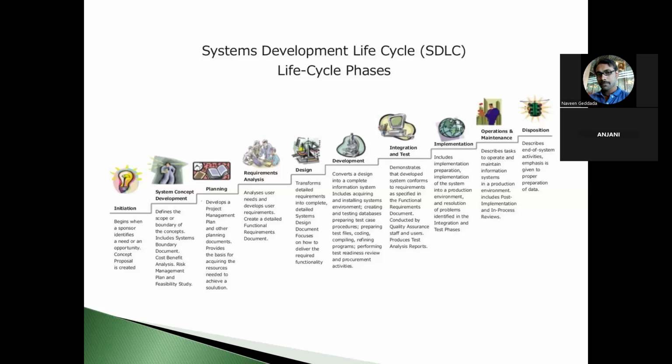If there is no impact, then it's good enough, and you need to move to the next ones, which are R7, R8, and R9. You need to check whether we need to update the requirements for R7, R8. If there is no impact, then it would be straightforward. You just need to update the version of the document. The earlier version, which is approved, is V1. Now you need to maintain the version as V2, and mention what change has been added into the document. Then, in that particular section, requirement R6, you need to mention what steps you are adding. For example, in this case, we don't have any impact on the already defined requirements.